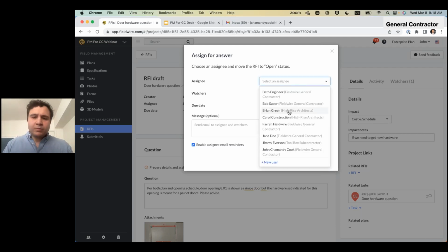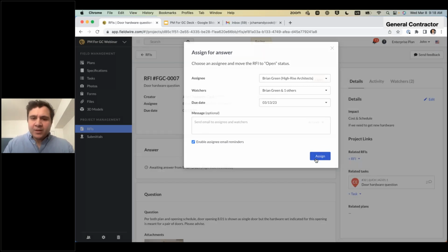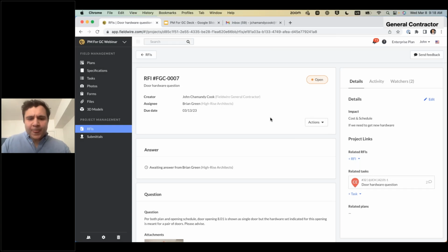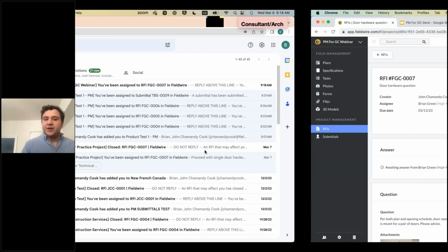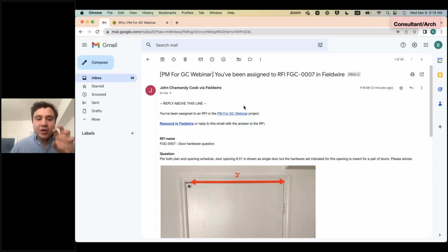So now, hey, let me go Brian Green on the architect side. I'm going to request it from him. I can assign a due date. Also, hey, I'm going to enable email reminders to make sure it keeps pinging him to fill this out on time. So let me assign that over to Brian Green. Now, Brian can answer this within Fieldwire if he chooses to do so. But what I love about Fieldwire is, we have these architects that are working with 5 or 6 different clients. They're on 5 or 6 different platforms, and they don't want to deal with jumping into all these different platforms. But keep in mind, they can still answer the email that they receive from Fieldwire directly from their email.